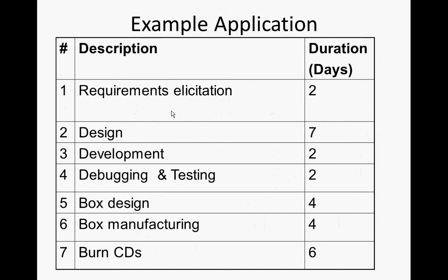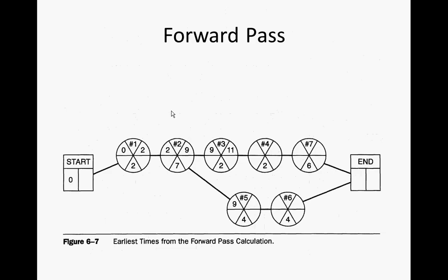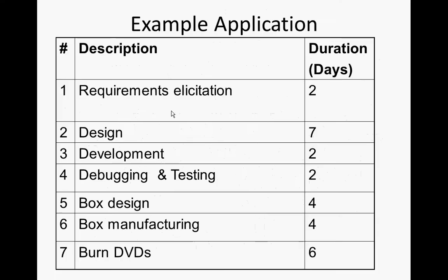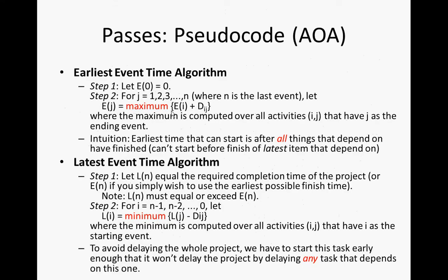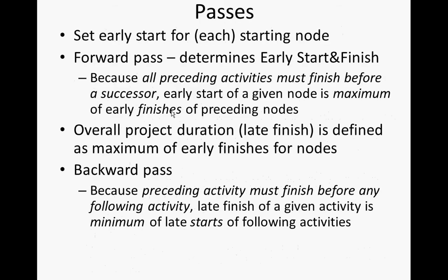You should also know something about the importance of dependencies, and particularly how they can be valuable in the case of changes. By representing these dependencies, I can compute a new schedule when it turns out, for example, maybe this guy took 4 days instead of 2. I can compute a new schedule accordingly. In this case, it won't cost much. Or if it took 6 sick days instead of 2, then it would become part of the critical path. Okay, I think that's all we'll go through today.